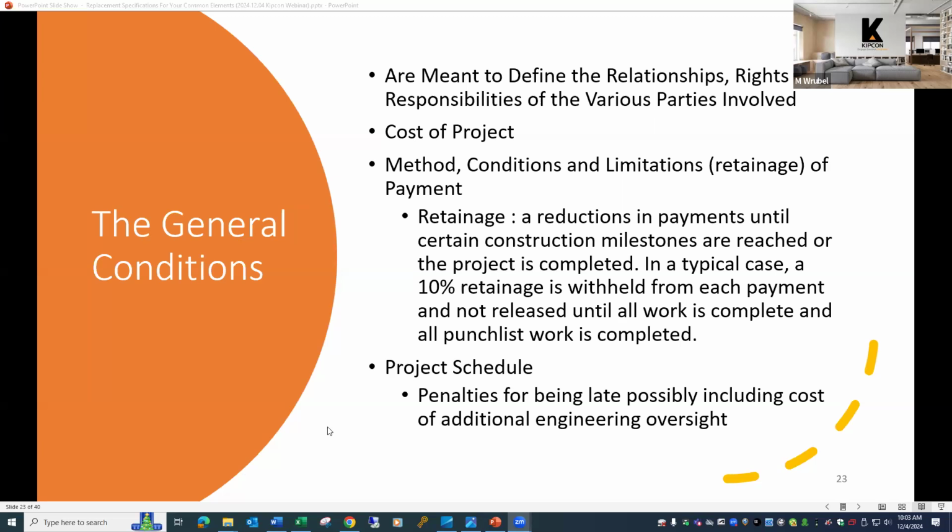One thing that is typically not included in an HOA contract is penalties to the contractor for going over the schedule. This is because a lot of the projects have a short time span and are often weather dependent, and the contractor doesn't always have control over the schedule. However, when they are bidding on a project, they're asked for a general schedule.